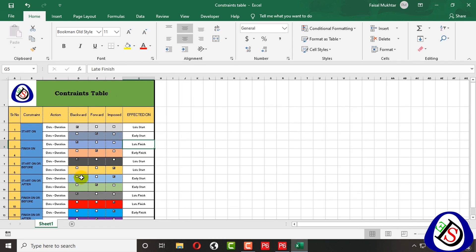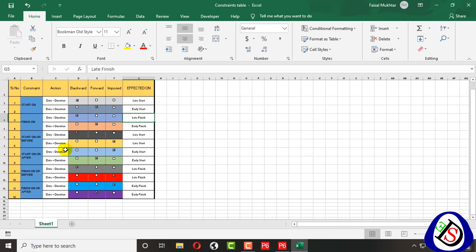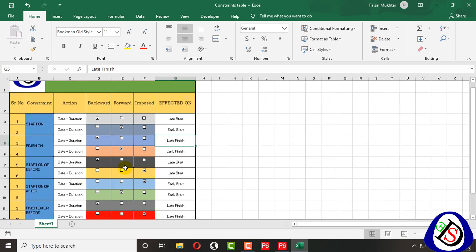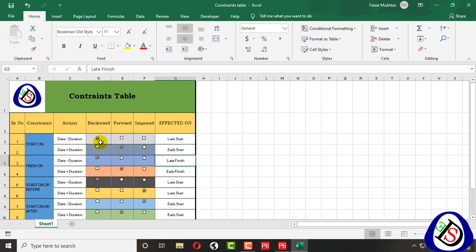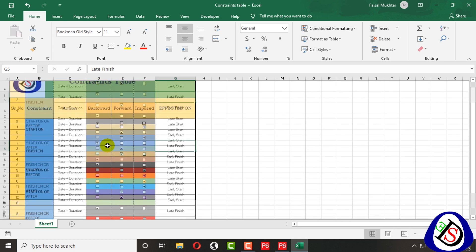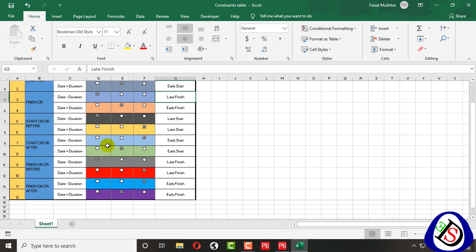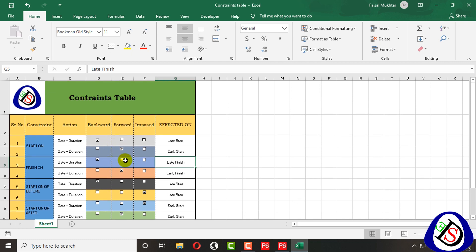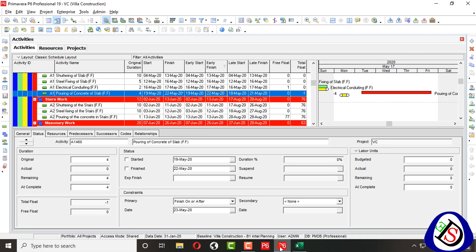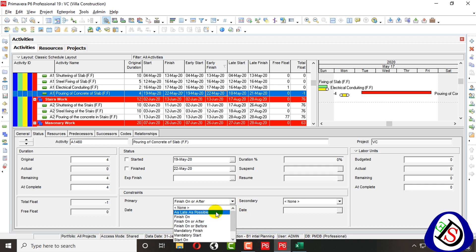This summary table clearly shows all the constraint behaviors — you can take a screenshot from here to learn and memorize them. I have also memorized them, but I made this table to avoid confusion. The table shows: backward/forward direction and which date is affected — whether imposed, Early Start, Late Start, Early Finish, or Late Finish — for each constraint type.